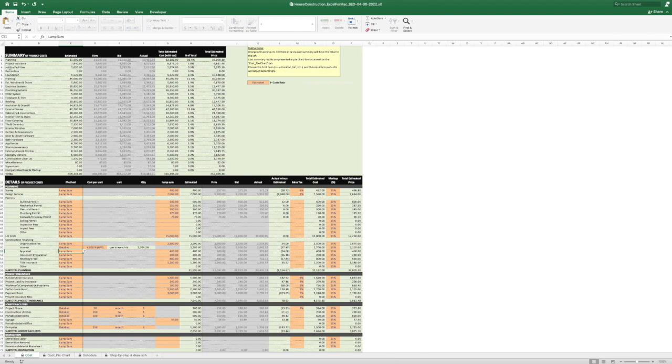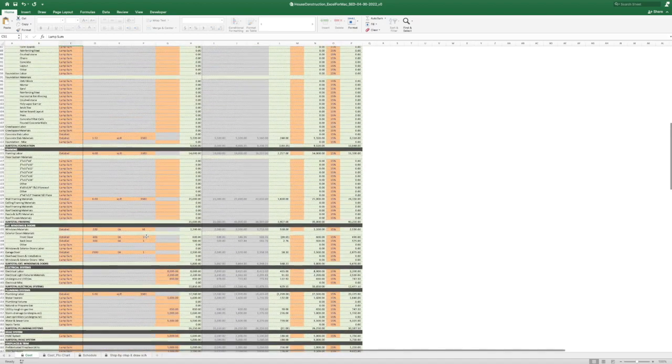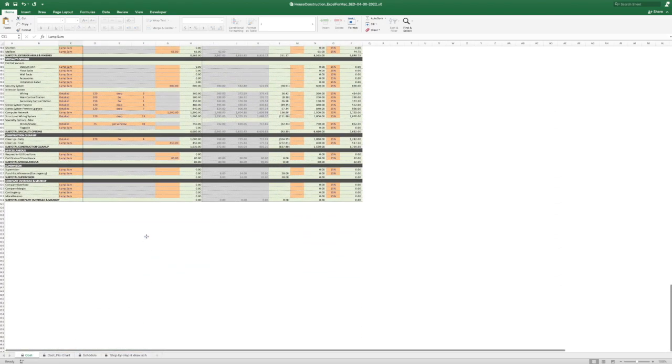So you go through all the detailed sections: job site facilities, demo, foundation, framing, exterior windows and doors, electrical systems, plumbing systems, HVAC, fireplace and trim, roofing, insulation, drywall, exterior veneer, cabinetry and countertops, interior trim and stairs, floor coverings, tile and ceramic, interior finishes, gutters and downspouts, door and closet hardware, bath hardware, appliances, site improvements, exterior areas and finishes, specialty options, construction cleanup, miscellaneous, and then if this is applicable for a custom home builder, supervision, company overhead and markup, and then the total is down here at the bottom. So you can see you have all of your items here.